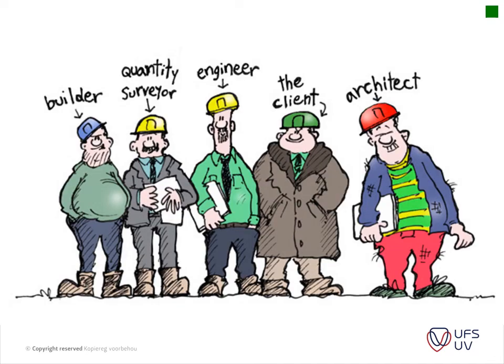Then in stage 2, oh, sorry, yes, I just had some examples of stage 1. Usually in stage 1, the professional team is identified, although the professional team can grow as you go through the design process, and you see, okay, we need a mechanical engineer, as a design and install mechanical installation won't necessarily work on this project. Then I just added some examples, I think from stage 2. So concept and viability is a very important stage in the project.